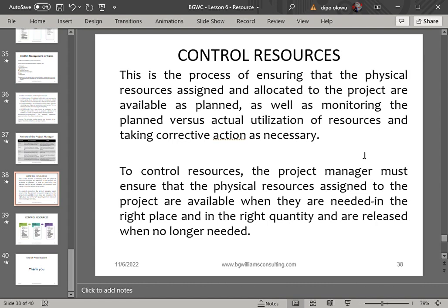If he needs 20 bags of cement, there must be somebody that will account. So some organizations structure it that way for the purpose of accountability. So that when they release 5 bags, it is taken note of, recorded, and somebody signs for it and what it was used for. It becomes accountable. So that is some level of control of your resources. But for software, I don't know. Maybe there may be software they are using abroad, but I don't know of it yet.